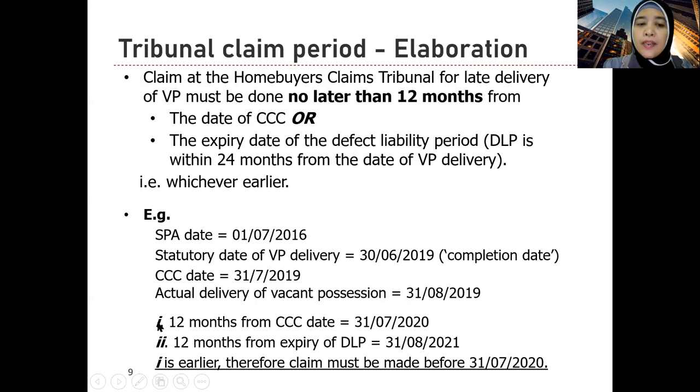So which one is earlier? Number one is earlier, which comes in 31st July 2020, earlier than 31st August 2021. Therefore the claim must be made before 31st July 2020. So you must claim for the LAD just now, before this date. Otherwise, the claim may not be heard at the tribunal.